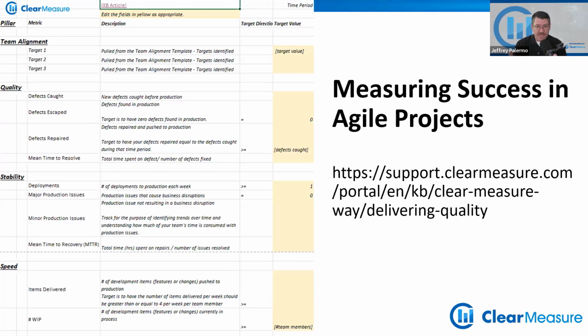And your metrics need to encompass some aspects that include your throughput, quality, bug resolution time, the number of completed items, at a minimum. And the KPIs layer onto the metric and create your view, your dashboard. A metric is just a number. A key performance indicator is the combination of a metric and a threshold. And that allows you to have a dashboard that has greens or yellows or reds.